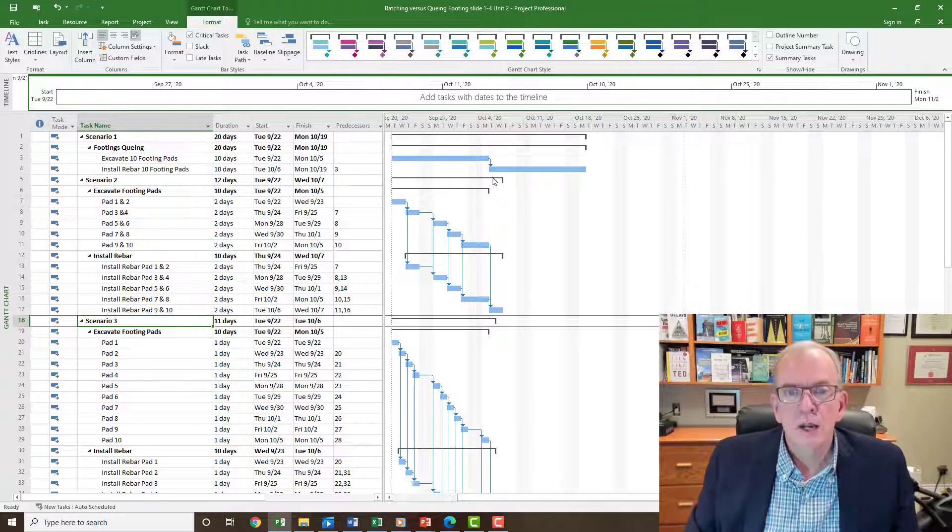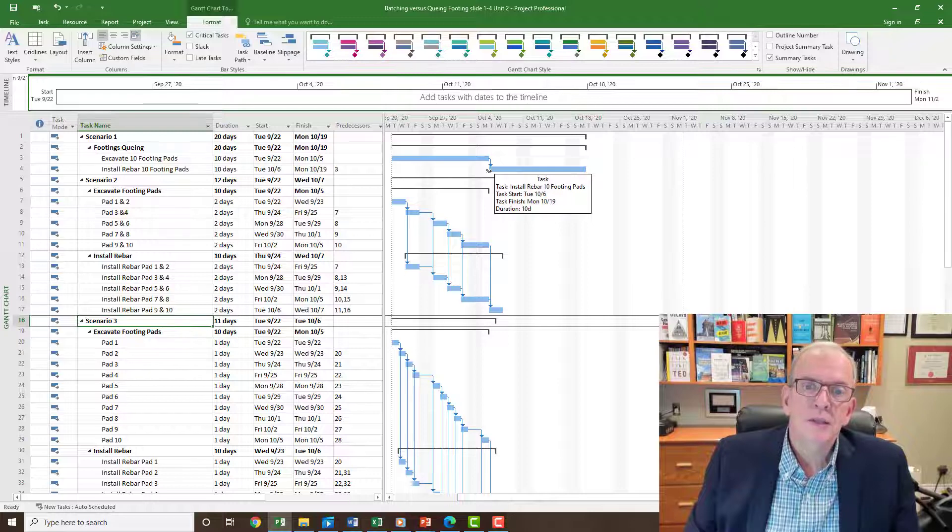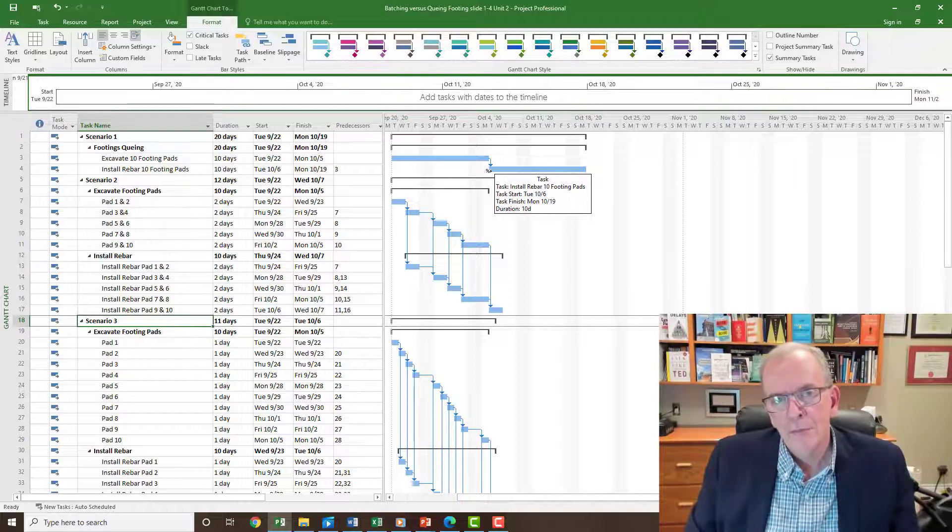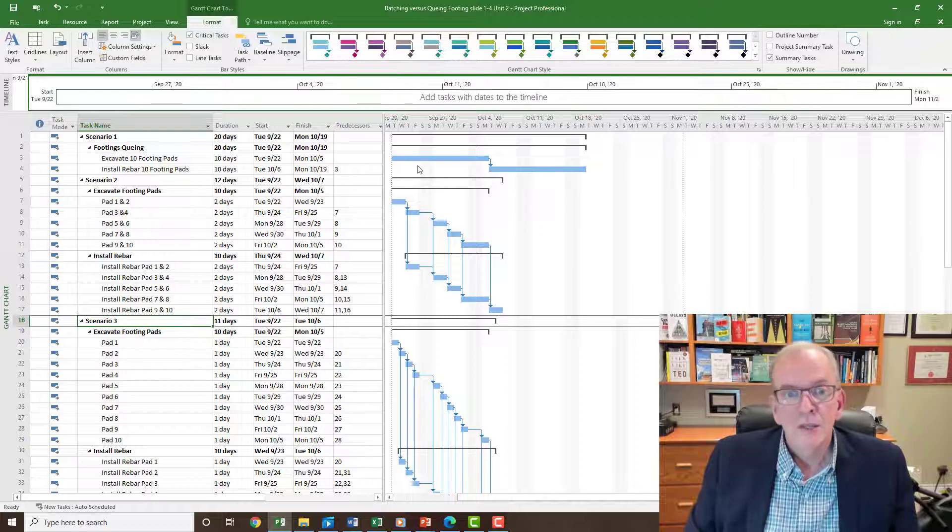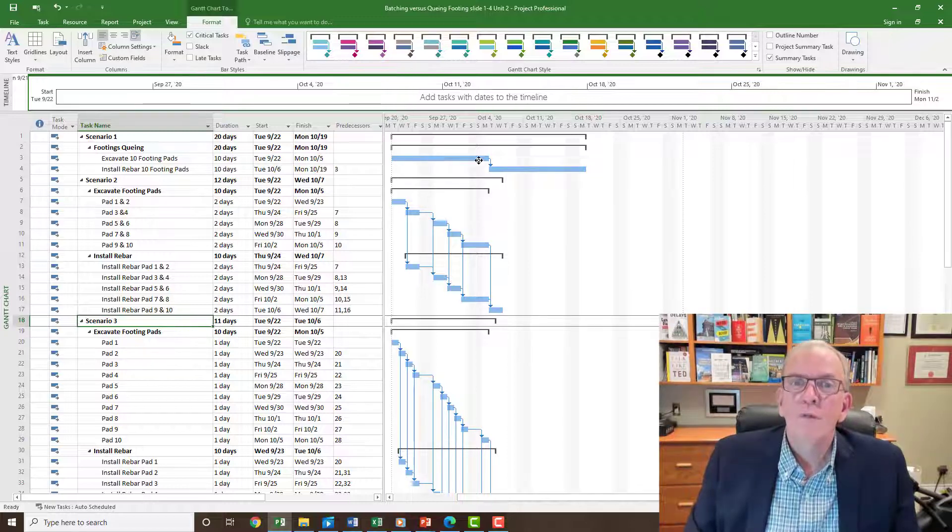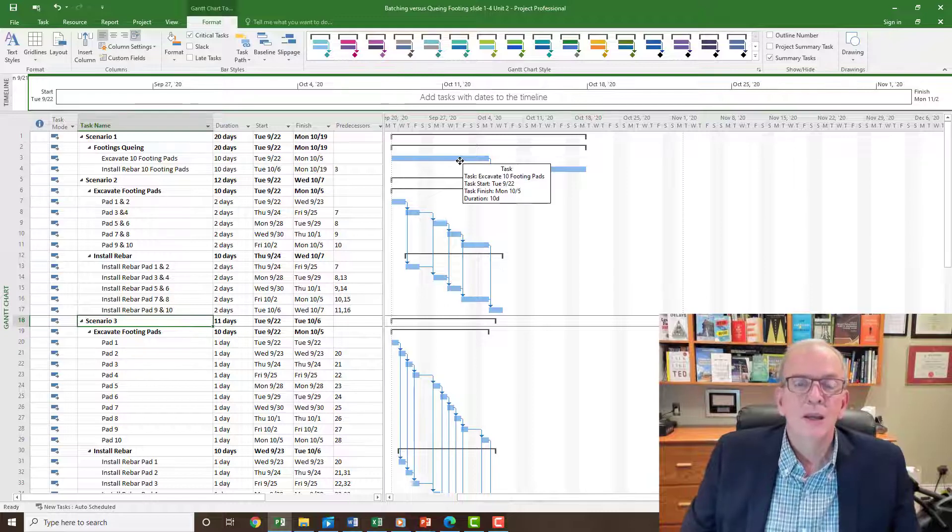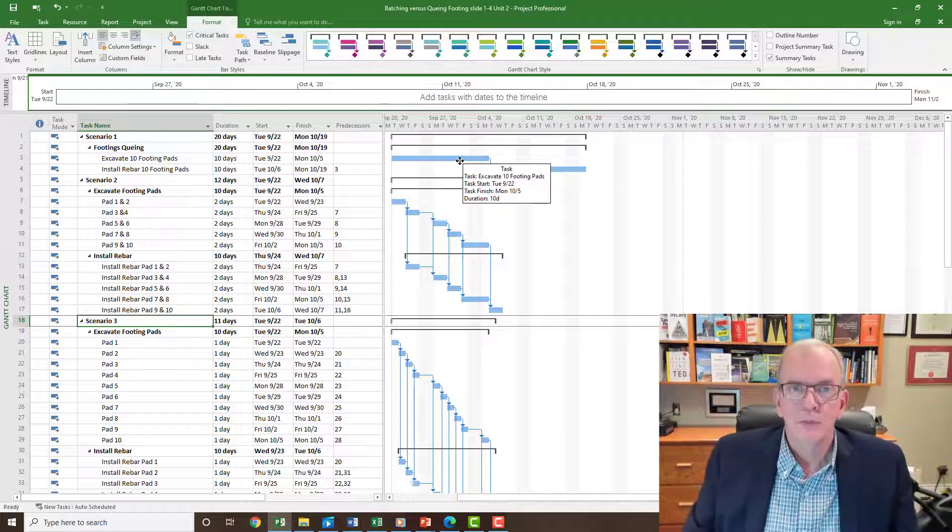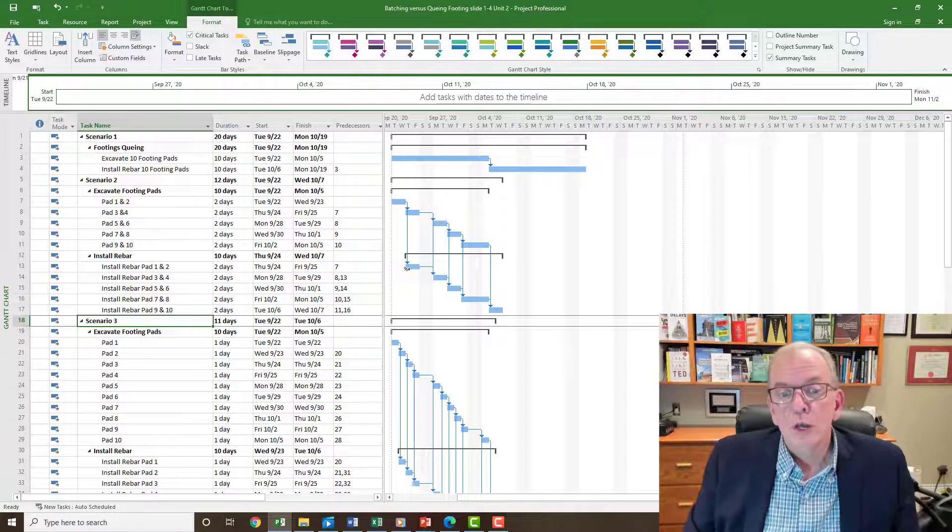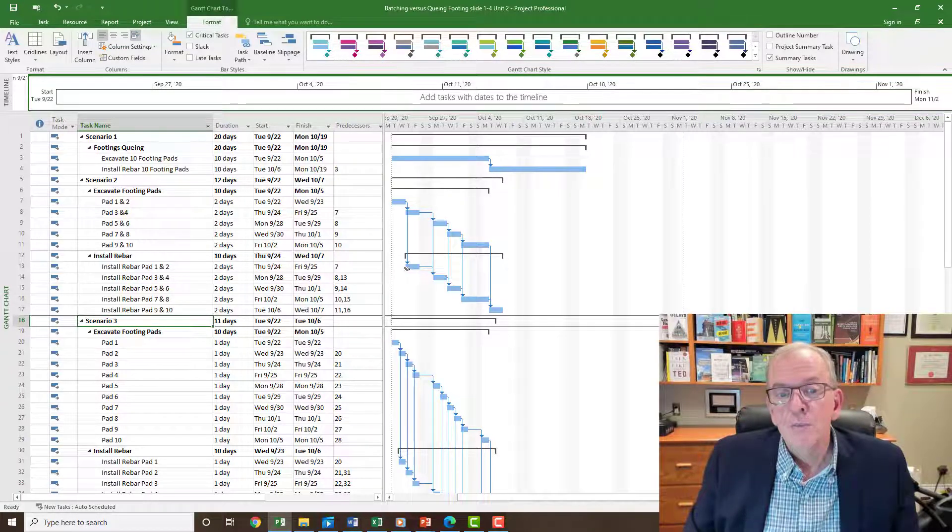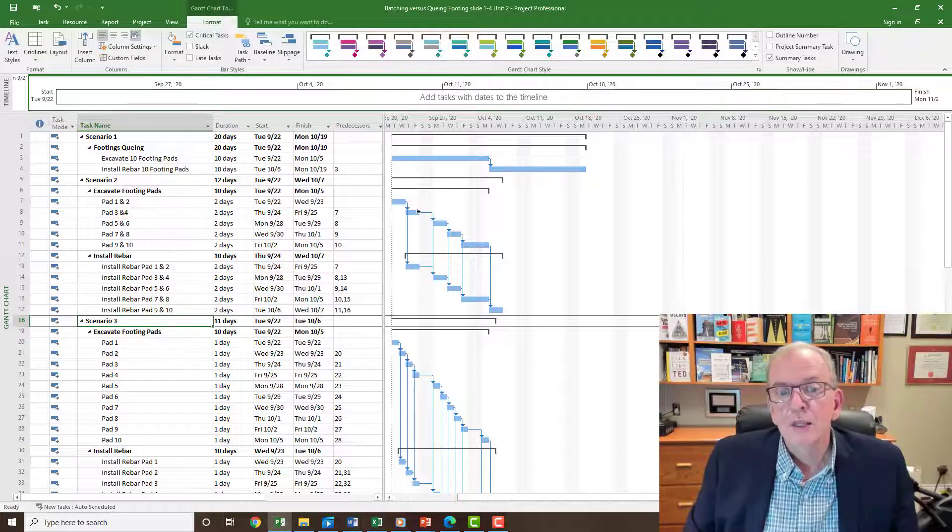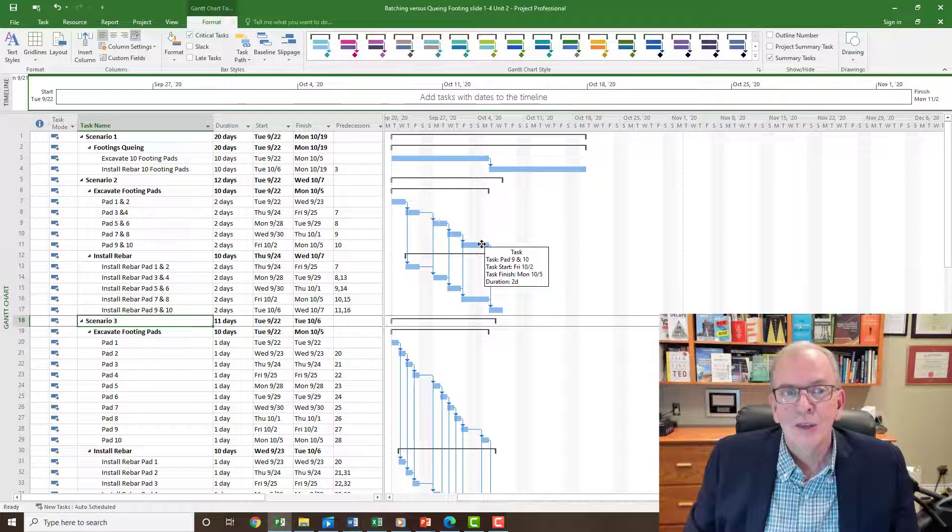Because there's another thing that you also get going on here. If you do all ten footing pads and then the rebar installer comes and they double check the measurements and they see something is off with the excavation for the ten pads, then you got to go and you've got to get them all fixed. They've all got to be reworked. If they're not big enough, they've got to be dug out a little bit more. If you do it this way, well you've only done two and you're going to get the feedback within two days.